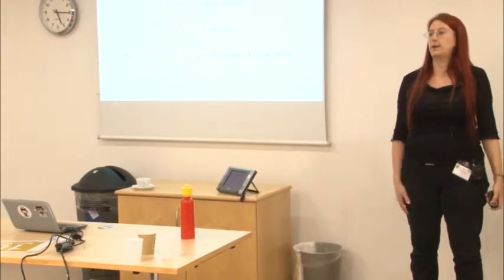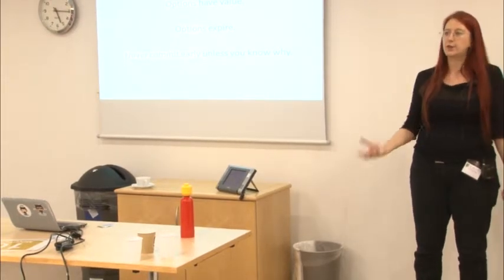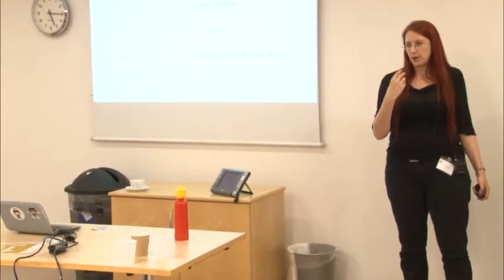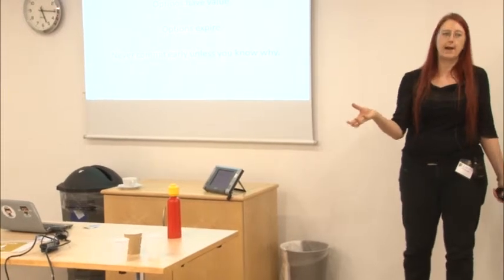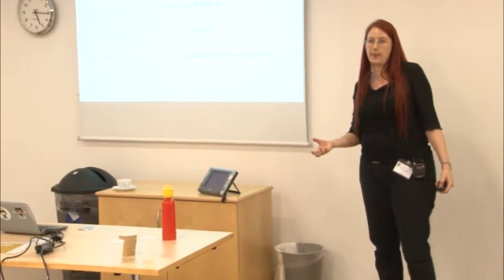The 1s and 2s, you want to know what's different and find a parallel, find a library you can use, find something off the shelf. The 3s, you want to talk to the domain experts, get their knowledge out of them, and that's a high analysis area. And the 4s and 5s, you want to know just enough to actually start out, to try something and get feedback.